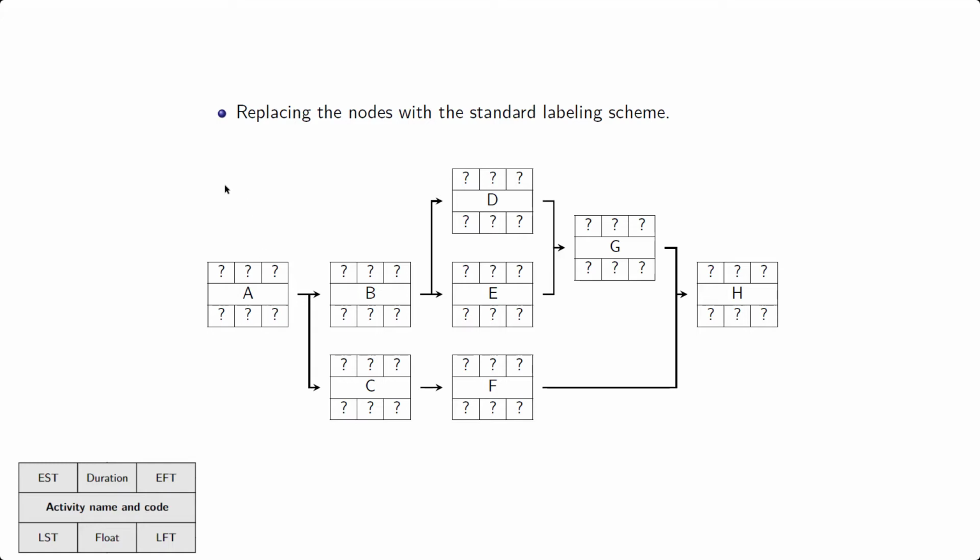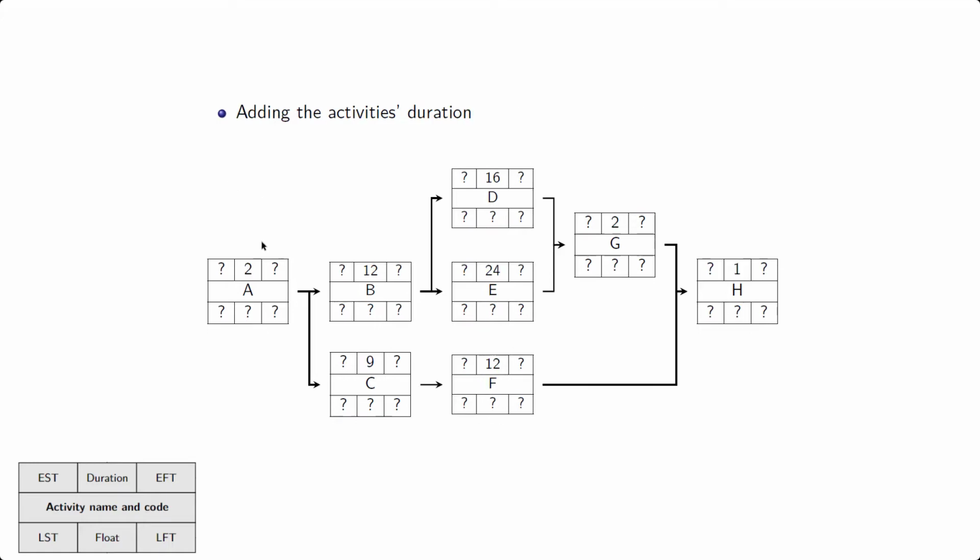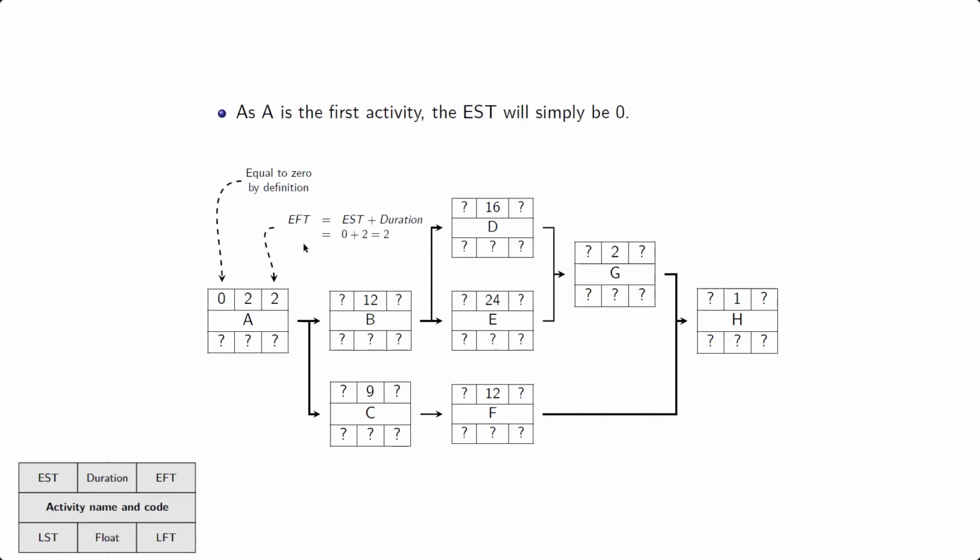The first thing I'm going to do here is to substitute in these different durations, which are exogenous, which we are just given as our input information. For instance, activity E for echo has 24 as its duration, 24 months I think in this example. Next, we're going to do a forward pass where we populate the top row here with the earliest starting time and earliest finishing time. We're going to start all the way from the left and move slowly to the right.